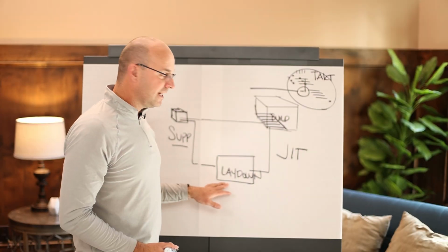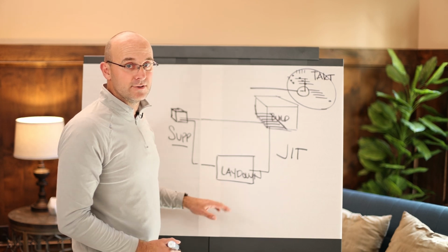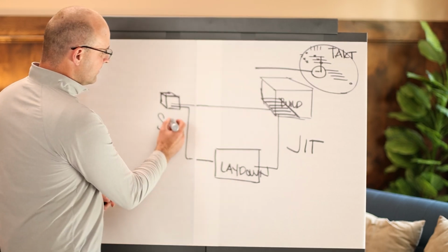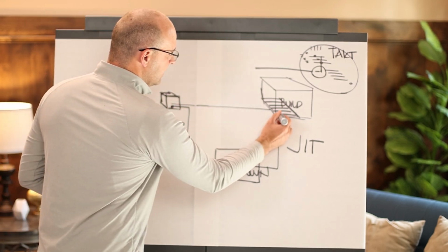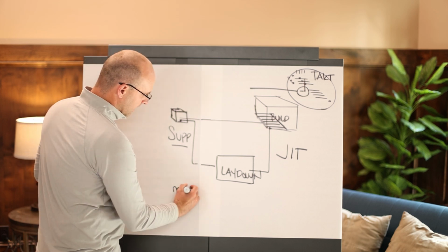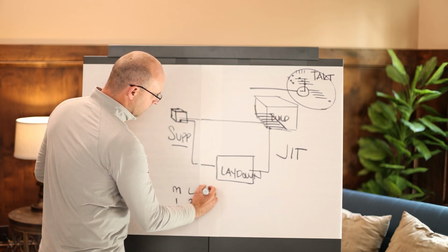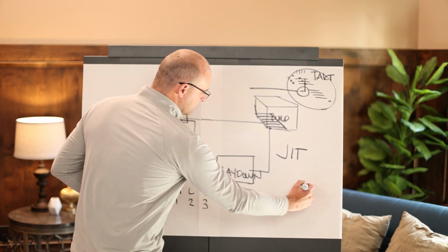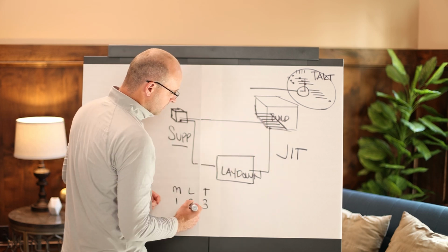And so your laydowns, it's totally appropriate to use these. The reason people don't like to is because you have a supply chain from here to here. And so this would be, manufacture the part, step 1. It would be load the part, step 2. It would be transport the part, step 3. And you go through these steps until it gets to the project site.